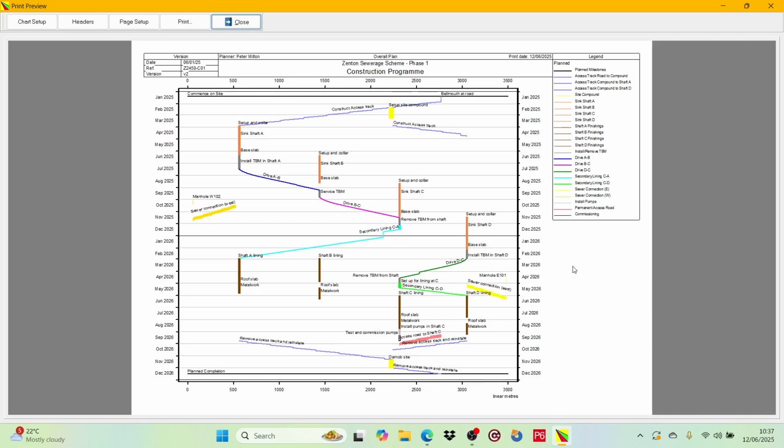and its purpose. Or you could dedicate an activity code to resources. You could have values for the excavation gang, the concreting gang, the pipelaying gang, etc. And then show a layout of where your resources are throughout the project. You can filter using the activity codes. So you could, for example, use the WBS line colours and styles as in this layout, but use a filter based on an activity code to just show activities required for a particular milestone, or maybe just activities undertaken by a particular gang. Activity codes also give you more options for sorting and filtering in the data input forms.